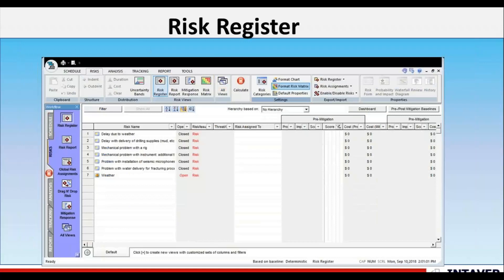In addition to the schedule, we have a risk register where we can identify risks. Once you have a risk workshop, you can take your risks and add them to the system. The integrated risk register is the focal point of the risk management capabilities. Each risk in the register has properties — who, what, when, where, and how. It can have risk assignment — how the risks are assigned to the model, either locally to specific activities or globally as a systemic risk at the project level. Risks also have a management plan centered around the risk mitigation waterfall chart, risk review, and a risk history.